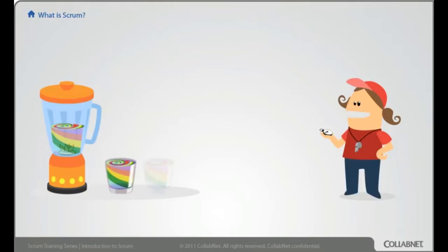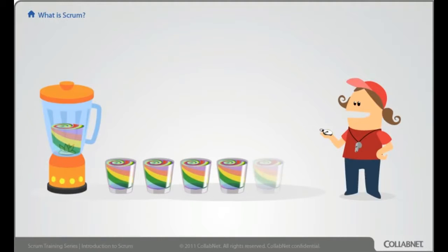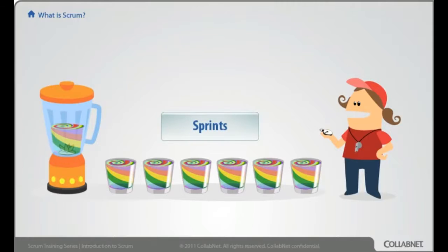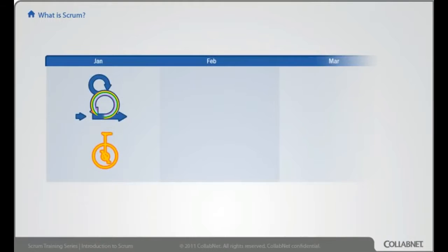Instead of dividing the work into activity-specific phases, we divide it into fixed-length iterations called sprints. Every sprint contains some combination of analysis, design, actual implementation, testing, planning for the future. Maybe we'll actually be shipping or deploying more frequently. Right from the first sprint, a Scrum team tries to build a working, tested, potentially shippable product increment, even if it starts out small. Every sprint they demonstrate what little bit of shippable product they have to everyone.